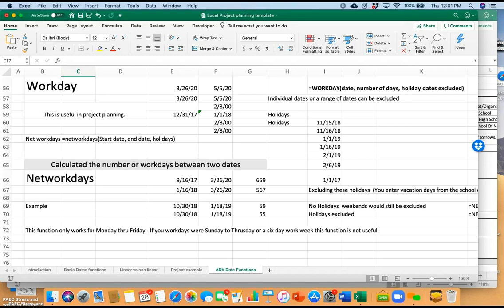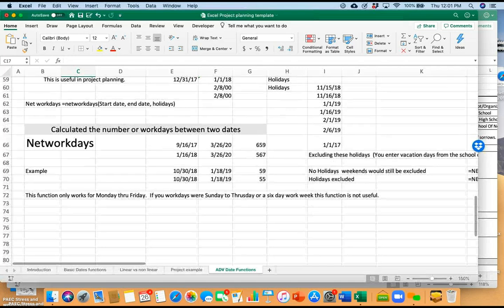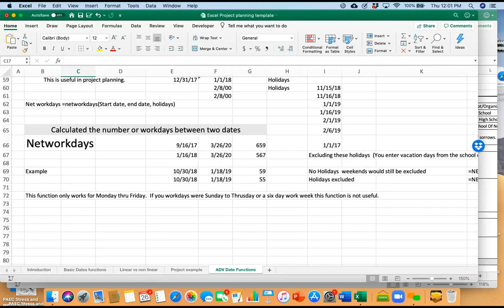So then at that point, I can take my whole calendar, provide all my holidays for the whole year and put it down as a range, and it'll take all those days out. It won't account for snow days, but you could always adapt that. But any of the things that were in the regular calendar, you can then calculate reliable days. There's a limitation: it only works for a Monday to Friday business, but schools are, for the most part, Monday to Friday businesses. So for a lot of uses, if you wanted to figure out how many days we have to provide meals to students, that works.